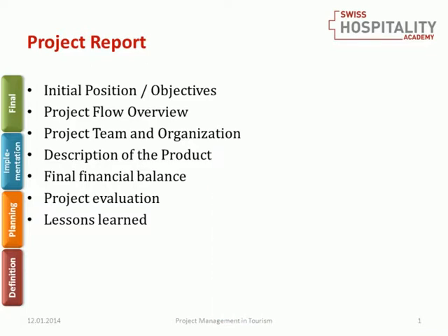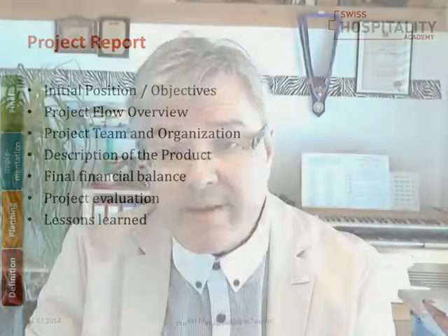And last but not least, you have to create a list of lessons learned. That is really, really important. We mentioned before already, a project is something you typically do just once. But there are, on a systemic level, elements you really can learn from. For example, if I'm planning a hotel, I need 6 months to get permission to construct. So I don't have to plan the next hotel, which is another project, for 3 months because it's not realistic.